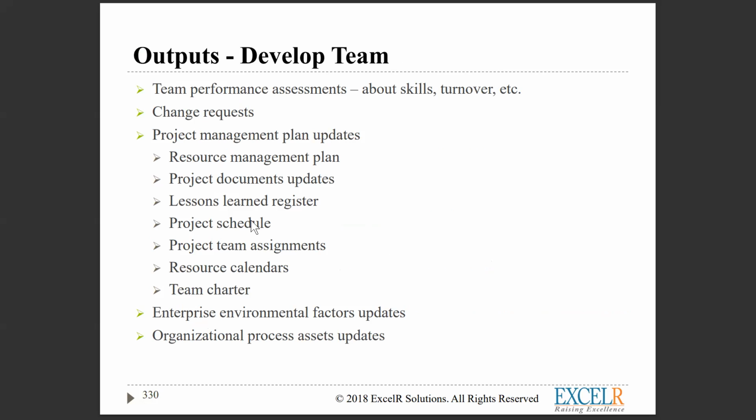Any change request in the project plan, you need to consider and update the project plan, and scope will be changing. Your resources will change. Resource management plan will change. Everything will change. You need to add resources or remove resources. Then resource calendars will change, right? And your team charter also will change.